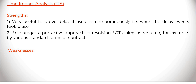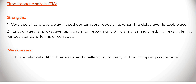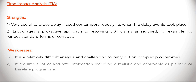Weaknesses: It is a relatively difficult analysis and challenging to carry out on complex programs. Next, it requires a lot of accurate information, including a realistic and achievable AS-PLAN or baseline program. And finally, the analysis is purely prospective; therefore, the estimated delay will usually be different from the actual delays. This, obviously, is a problem.